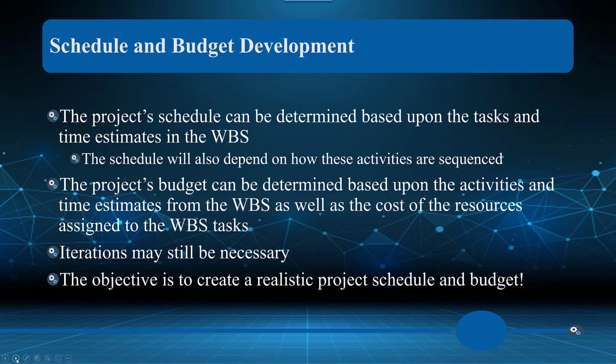So of course we've tried to break down that work breakdown structure into manageable pieces that the work can get done on realistically, the resources that are needed for that, when we can go ahead and celebrate our accomplishments with milestones, what those milestones detail. Now remember, the milestones are not, yay, we finished the prototype. It is, yay, we finished the prototype and the customer accepted it, and thus that portion is finished. That's the key. Iterations may still be necessary.